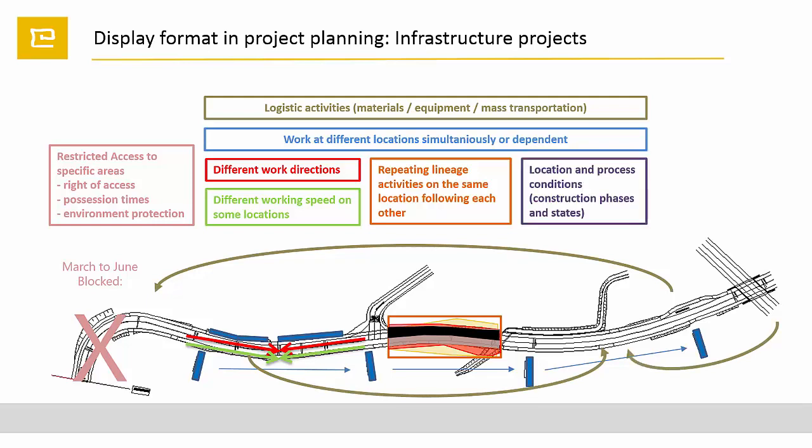Very often there are additional location and process conditions when specific construction phases and states are defined for a location. All the construction process has to swap to the other site due to traffic redirection phases.